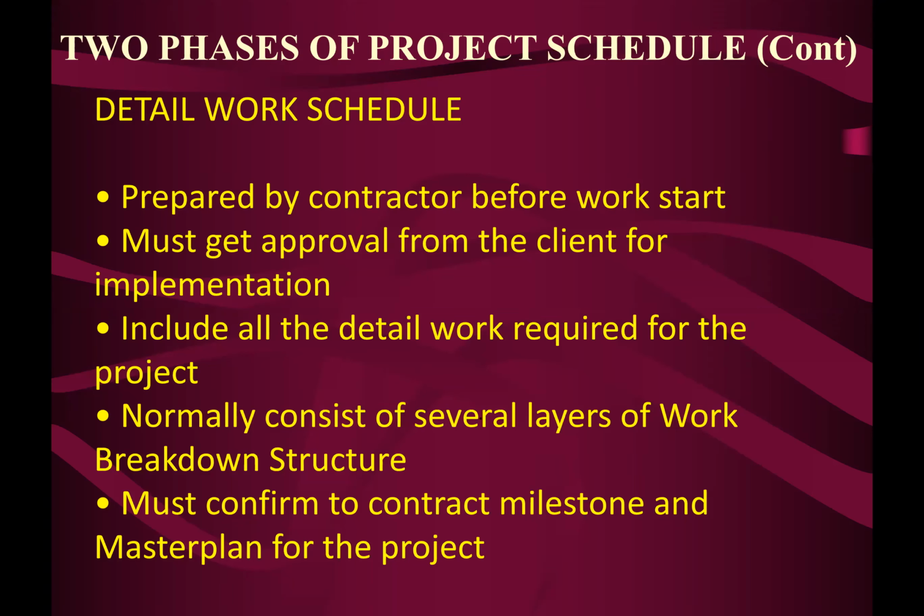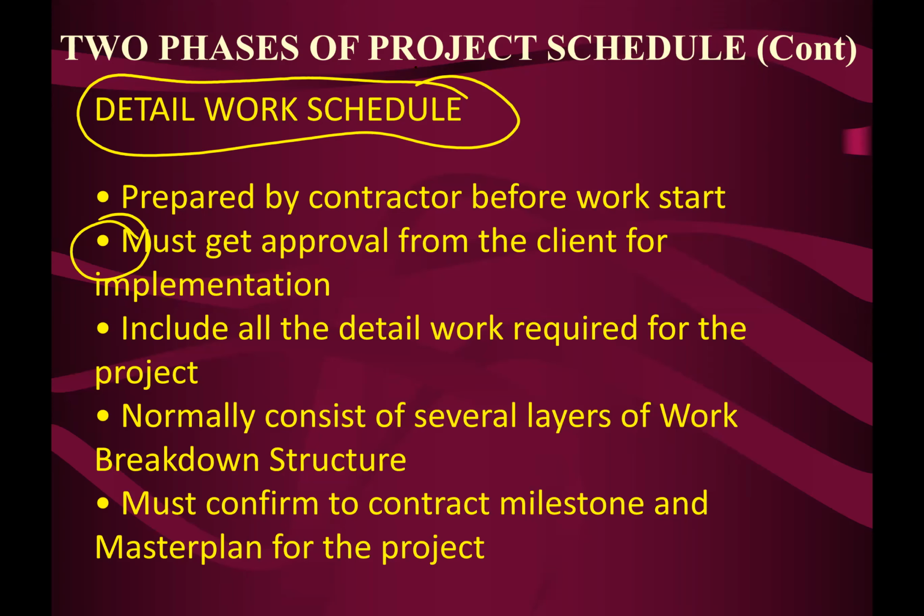Okay, so the detailed work program prepared by the contractor before work starts must get approval from the client. During tender, the contractor normally prepares a work program for the tendering purposes, and the contractor never knows whether they could win or not. Let's say at the end of the day, the winner has been declared, and contractor C is the winner. Then during a few weeks before the start of the actual construction work, he needs to submit one of the first things, which is the detailed work schedule. This detailed work schedule is the real thing.